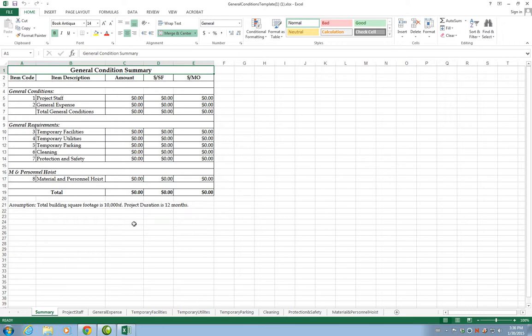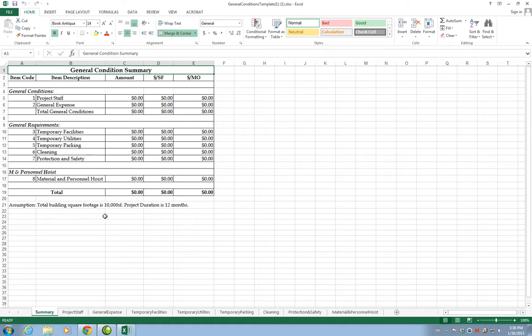The first tab is a summary, which is a total amount from the different tabs that they have inside the same template. This will accumulate all the costs for General Conditions, Project Staff, General Expenses, and then the total General Conditions.